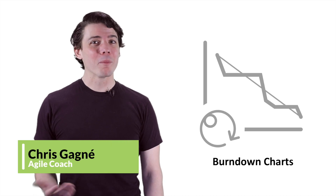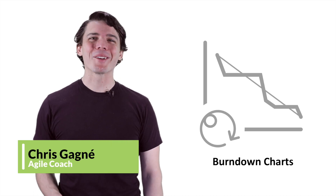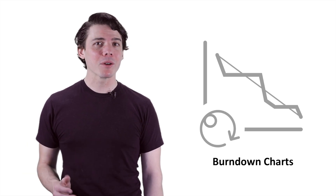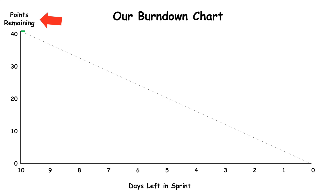A burndown or burn-up chart is an information radiator designed to show time and work remaining for a sprint or release. The most common use of a burndown chart is to show the number of story points not yet accepted by the product owner against the days remaining in a sprint. These sprint burndown charts often include an additional line illustrating the ideal burn rate to keep pace.